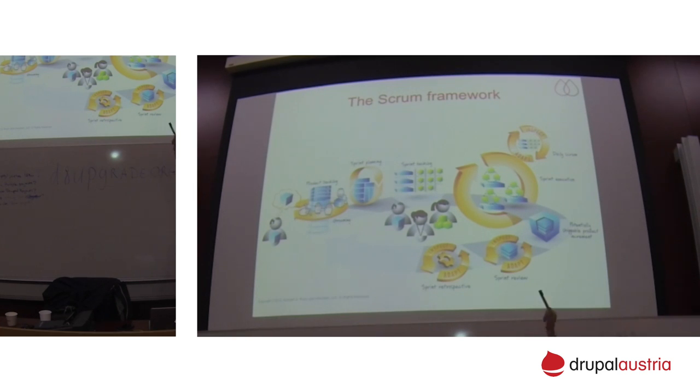So these guys should perfectly know what they can deliver in a 3-week sprint. And based on the prioritization given, they make the sprint plan. Right, and they start cycling. This cycling means that every day these guys have their ceremonies, which are the daily stand-ups. They meet at the beginning, they talk about what they're going to do this day, what they did yesterday, and whether they have some blockers. The Scrum Master acts to remove blockers, answer questions, and get feedback from the product owner. And this is happening every day, the daily Scrum.